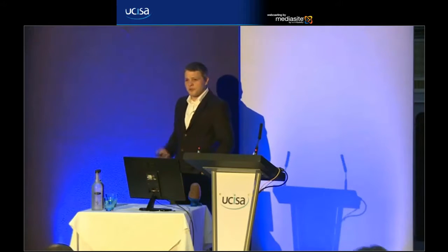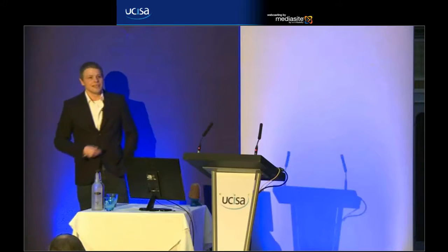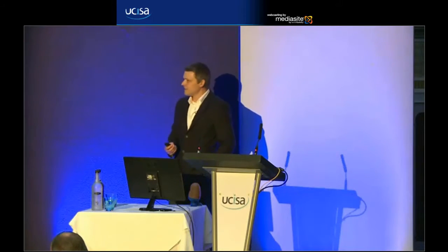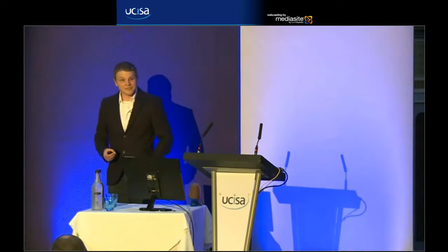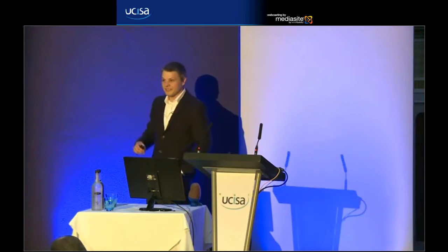So there were some problems with this. When we were looking at this, we'd been using this type of traditional methodology for a long time. Key problems were around requirements gathering. It tends to be very prolonged because you've got to get everything out at the beginning. You're trying to find everything that the users want. It tends to be inaccurate. Users, when they're thinking about how they want something to work, don't often think about everything that they want at the beginning, so you'll miss things out.